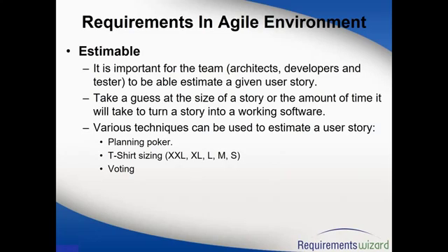Correct? But that should not be the basis of estimating. The basis of estimation should be how much work it really is, or how complex that particular story is. So that's why you want to take the hours out of the calculation and say, give me the size or complexity of it. There will be some definitions around what XXL means, what XL, L, large, medium, small is, and based on that, the team will basically vote.